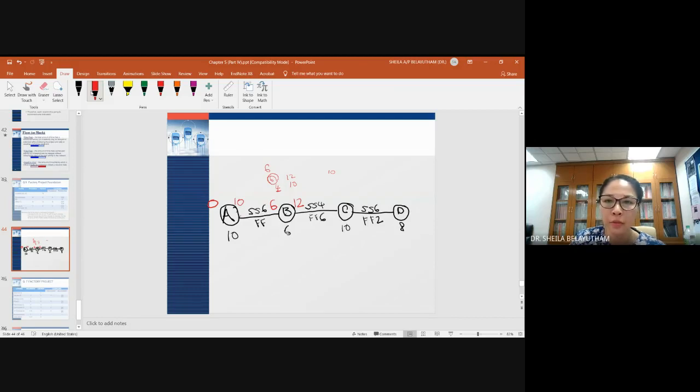Okay, so moving forward, you have two relationships, start to start 4. Activity C will start 4 days after activity B started. So 6 plus 4, you get 10. Plus 10, you get 20. Or you have another relationship which is finish to finish 6. So C will finish 6 days after B finish. So 12 plus 6, C will finish 18. Minus 10, you will start 8. So the larger one to accommodate both relationships will be 10 and also 20.